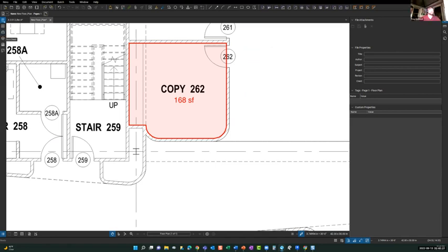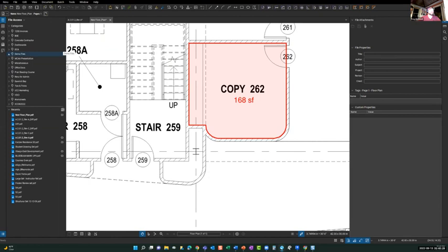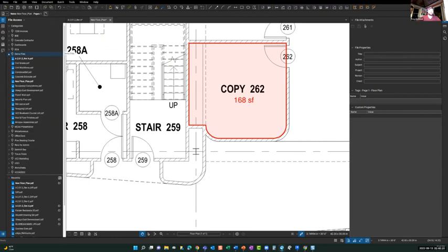Right. Yeah, we can do a couple different things there. We could either do the formulas for all of that in Bluebeam, kind of like I showed here, really rough, or we could use Quantity Link with the extreme version and have the markups feed the total quantity directly into that Excel file. And then you have all your formulas out there.